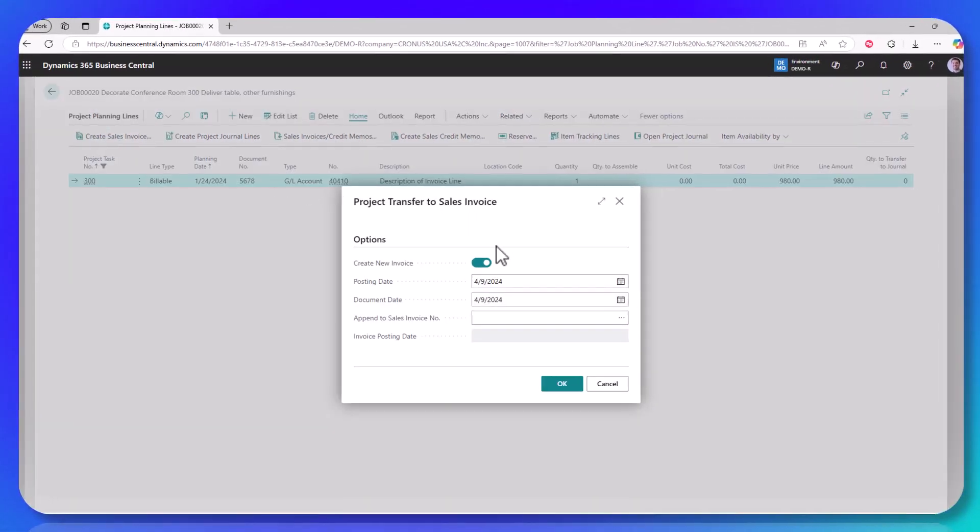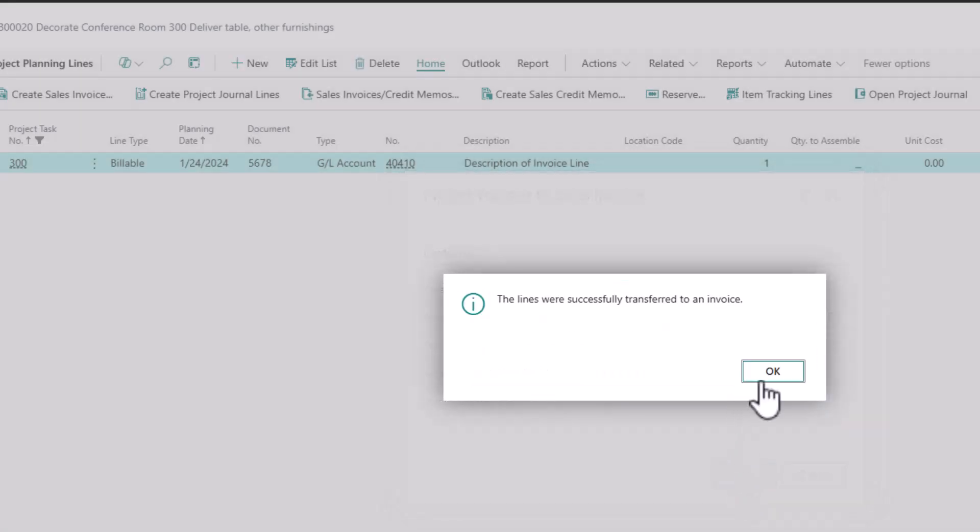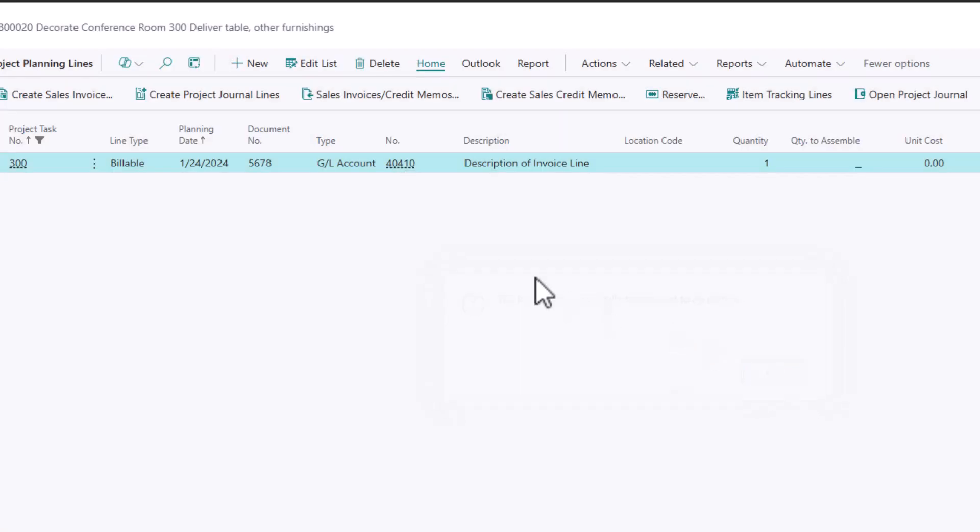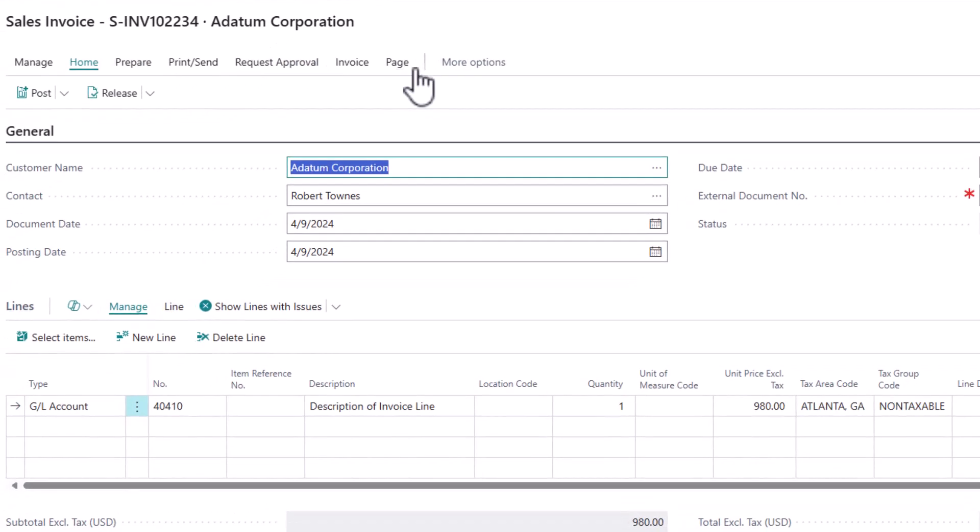So I click create sales invoice. I do have the option of appending to existing sales invoices. So if I turn this toggle off, then I can select an existing sales invoice in my system. In this case, we're just going to create a new one. So I'll say okay, tells me that it's been transferred. And then there's a button at the top that can show me either a list if there's multiple, or the single invoice will open up if there's just one.